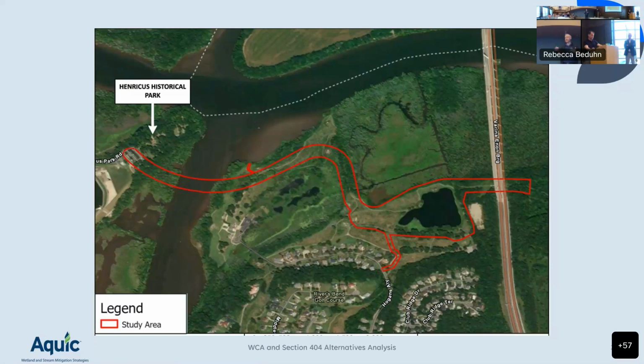We're reviewing this is our review standard for the impacts, but our whole goal at the end of the day is to manage the wetlands as responsibly as we can, manage the aquatic resources as best we can. So what I would suggest, if you are encountering a project like this for a new road that's got a lot going on and some high quality stuff around it, is that we put some effort on the forefront to identify where there's clearly some high quality wetlands that should just straight up be avoided. If they're out there, those are where you avoid.